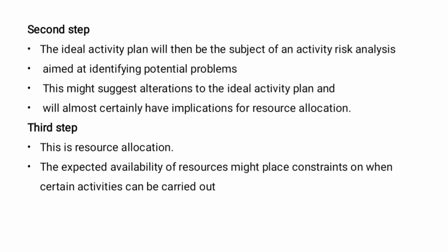Second step, the ideal activity plan will then be the subject of an activity risk analysis aimed at identifying potential problems. This might suggest alterations to the ideal activity plan and will almost certainly have implications for resource allocation. In the third step, resource allocation, the expected availability of resources might place constraints on when certain activities can be carried out.